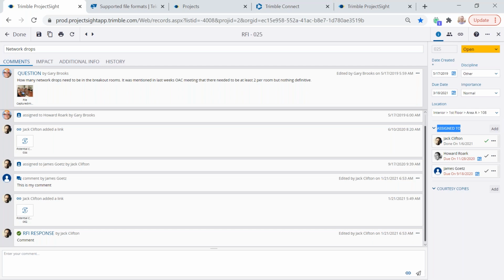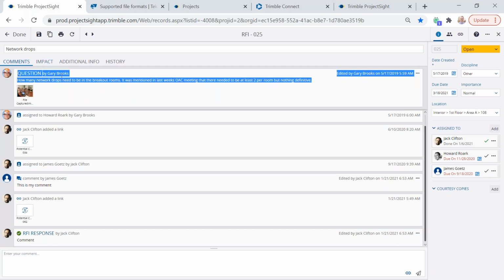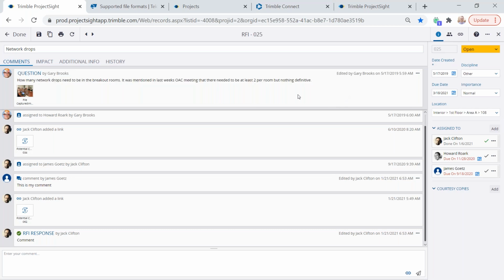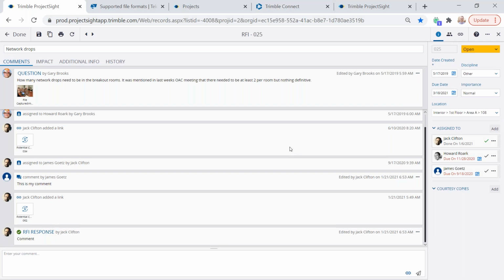I've got this one assigned to a few individuals, Jack, Howard, and James, right? So at this point, when this was created, they all got an email that said they have an assigned RFI. It's going to show them the title, the question. It's going to have a hyperlink that goes back right here. They can also reply to that email, which will then be captured in our comment section, right, as a single comment within there. So if you have outside contractors that don't want to log in, but you need an answer, they just simply reply to that email and you're still capturing that within that record type in one central source.